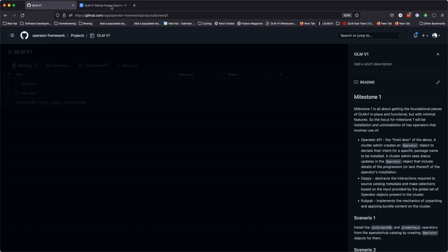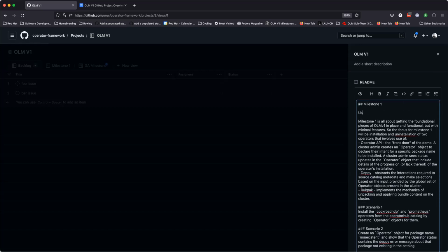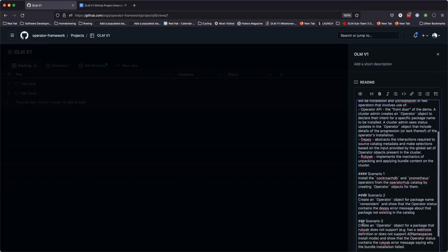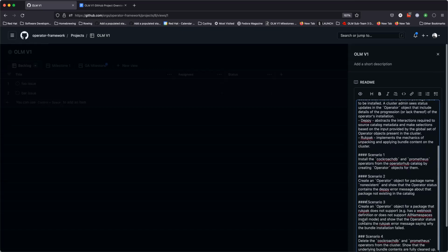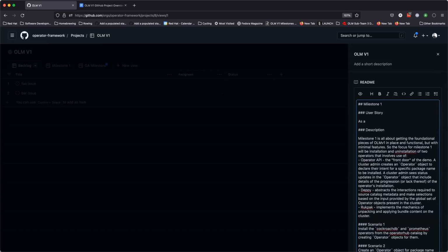Yeah, or the user story maybe is some sort of integration story that another software framework has. But I think just calling a couple of our subsystems ready and then leaving it out there as milestone 1, while it's not really fulfilling or addressing a certain need, is not going to get us the feedback that we want. That's not going to invite the collaboration that we are seeking here. We need to release something that's more tangible and says, now you can do this. This is something that we probably want to discuss and define further and get feedback on. But it needs to be sort of tangible, right?